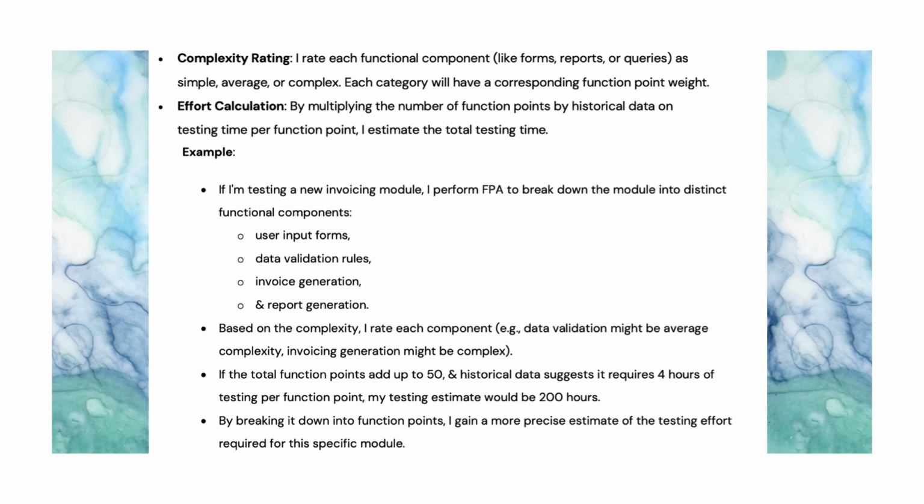If the total function points add up to 50, and historical data suggests it requires 4 hours of testing per function point, my testing estimate would be 200 hours.